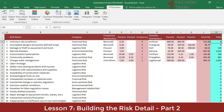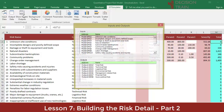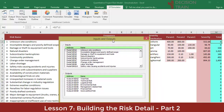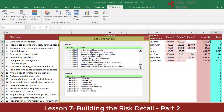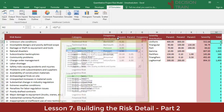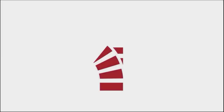The model must know in advance that the cells in column M must be considered as input variables. Note that an input variable is not necessarily a distribution function — in this case, it is the multiplication of two distribution functions. In the data sheet, cells in the range M2 through M21 have already been declared as input variables, and their values will be collected during the simulation. In the professional version, if you want to add more risk lines starting from row 22, those cells from column M should be declared as output variables using the DT simulator ribbon icon to include them.